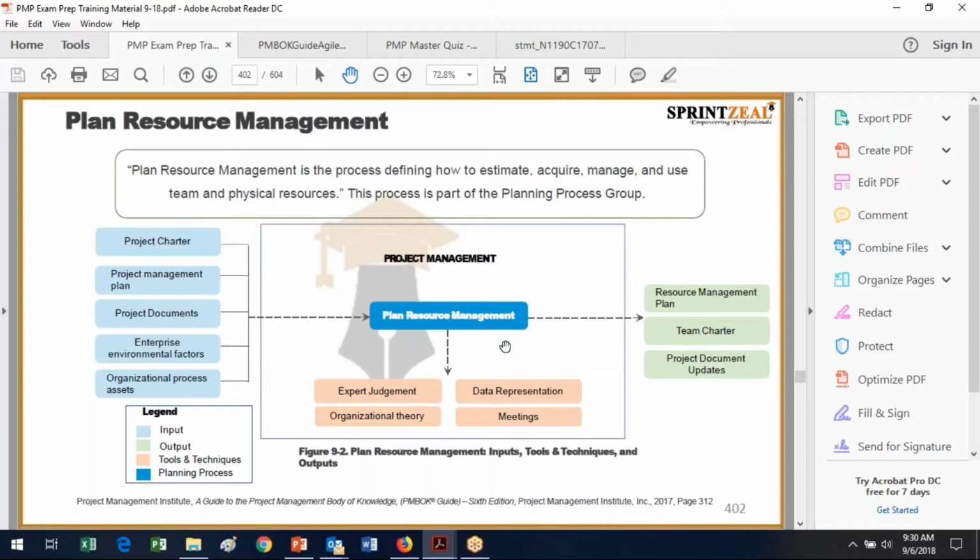And again, the project charter probably had some high-level resources that were required for the project, so that you had some idea of what you've got to get. So, do you need to have access to a sand pit because you've got something that needs sand and gravel, rock or what have you? Or do you need access to water because it's a very water-intensive process? Things that are prevalent and overarching in your project are probably resources named in the project charter.